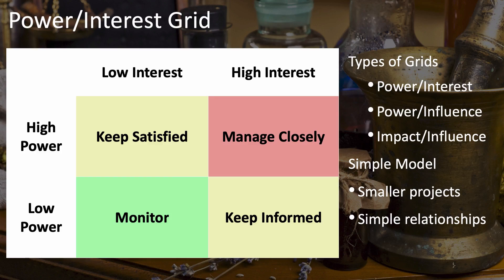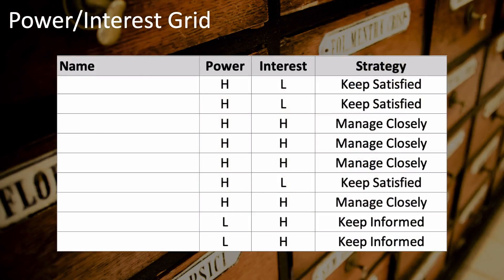These types of grids are simple two-dimensional models — useful for smaller projects or projects with relatively simple relationships. You can use power and interest, power and influence, impact and influence, or any combination. I tend to use a spreadsheet where I record power and interest for each stakeholder, then use a simple formula to determine the management strategy based on those values, with conditional formatting for color coding — for example, highlighting 'Manage Closely' in red. You can use whatever works for you, but I find this approach useful.